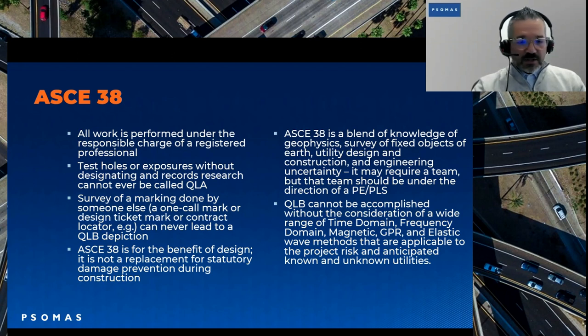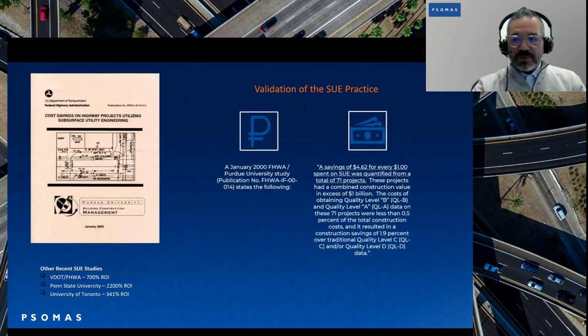So here's the validation, and I'm going to kind of speed up a bit so that I don't put us behind. Validation of SUE practice. By understanding ASCE 38, we have a $4.62 saving for every dollar spent on SUE. That is the main reason why we try to push out ASCE 38, because of that savings once you get to construction.